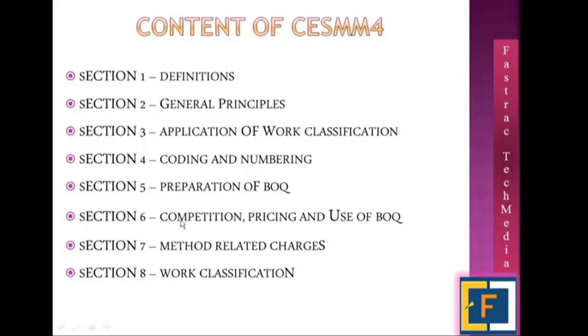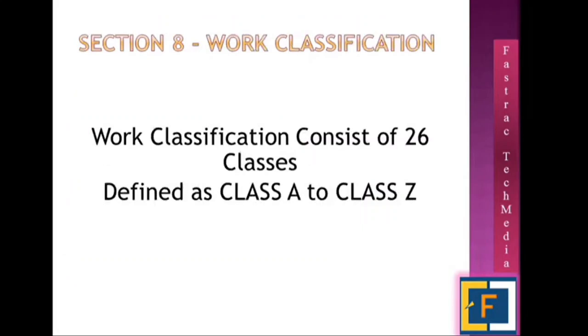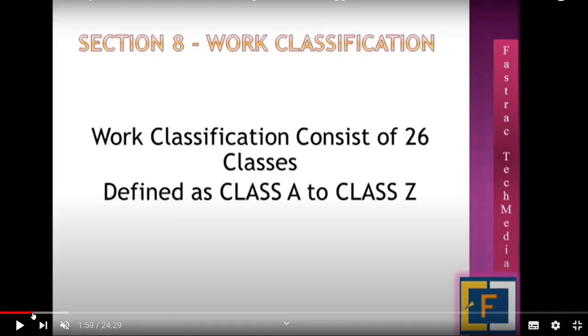So preparation of BOQ itself depends on CESM, and the standards mentioned in section 5 are to be followed while you are making a BOQ. So again, we are directly going to section 8. Sections 1 to 5 we will study in our workshop.